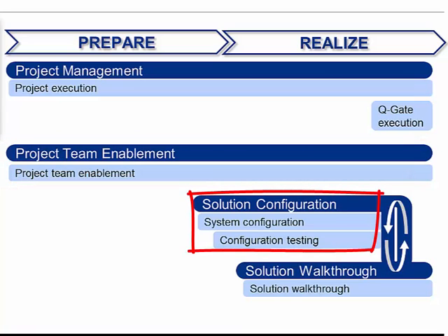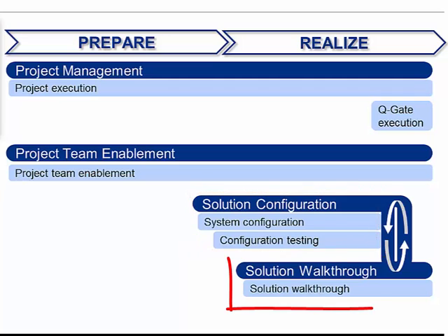During the solution configuration stream, the system is configured and tested using sample customer data. This includes the configuration of any relevant mobile devices and connections to external service providers. Lastly, a solution walkthrough demonstrates for the customer what his end-to-end process will look like within his system.